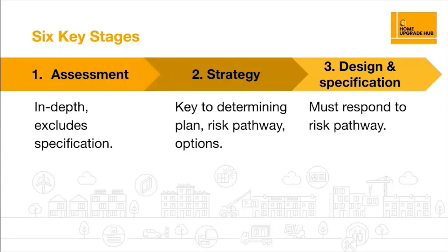So the starting point for all projects will be an in-depth assessment of a home, and it's important to stress that that's not a routine EPC. The assessor role is a little bit more limited than it might have been under previous schemes years ago. So specifically, they're not specifying, so they're not talking about particular products or particular measures. Their role is very much about collecting the data and then providing that to the retrofit coordinator to make a plan. So that plan, that strategy, that's stage 2.